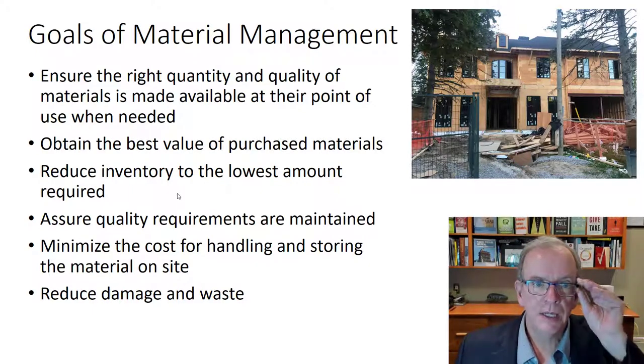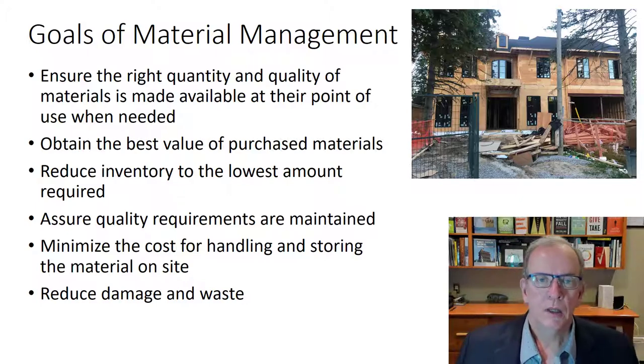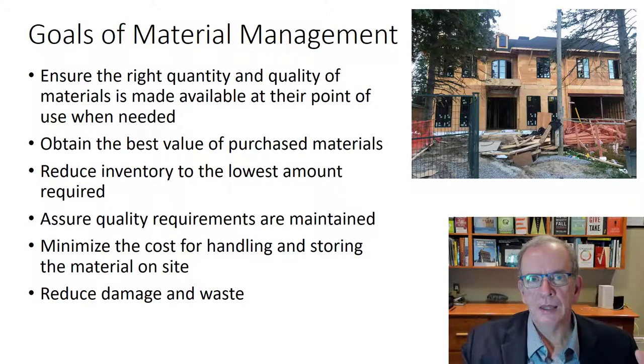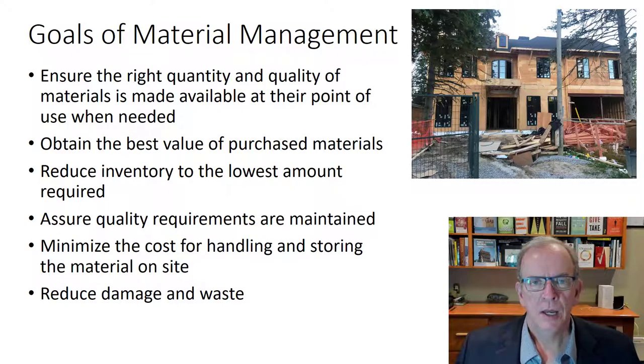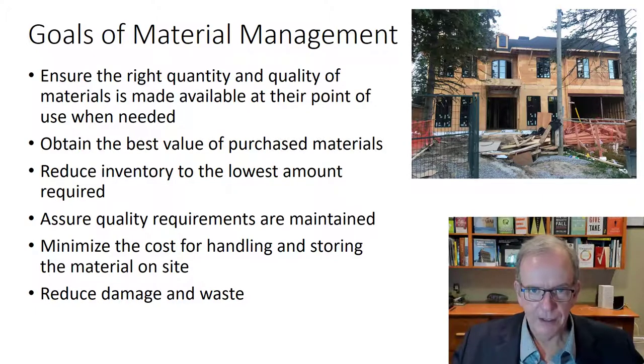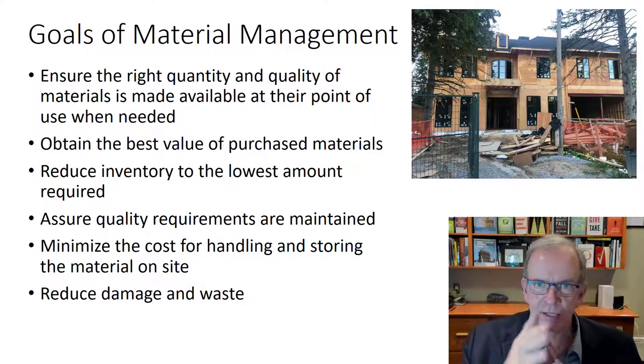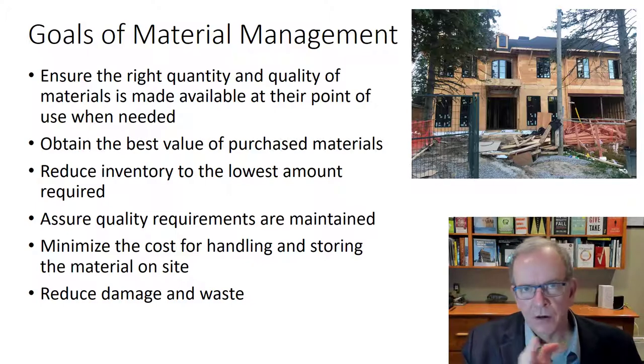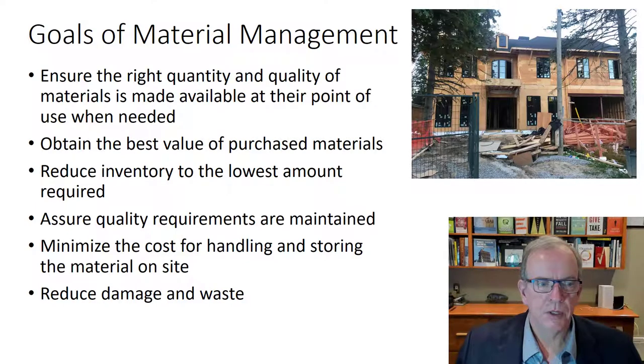When we talk about lean, that's a huge deal. Lean is all about having a continuous flow of work on the project. So that means you want to have materials delivered at the most responsible time. We'll get into that in another lecture. But the most responsible time is enough that it's there, that when the workers are there, they have it, but not so much in advance that it's in people's way. So there's this fine line, and different materials are at different areas on the spectrum on this.